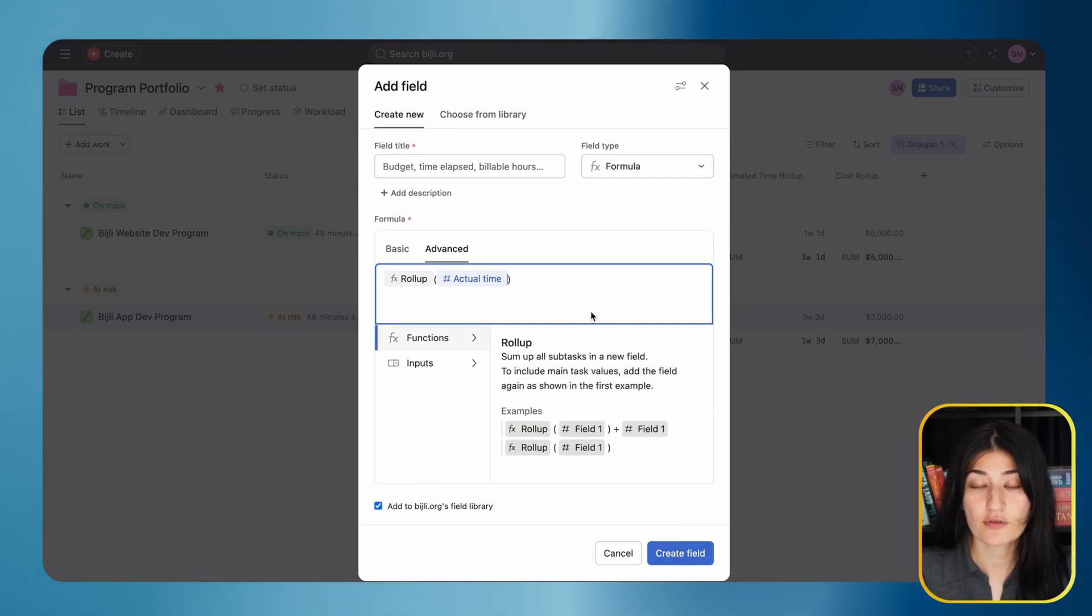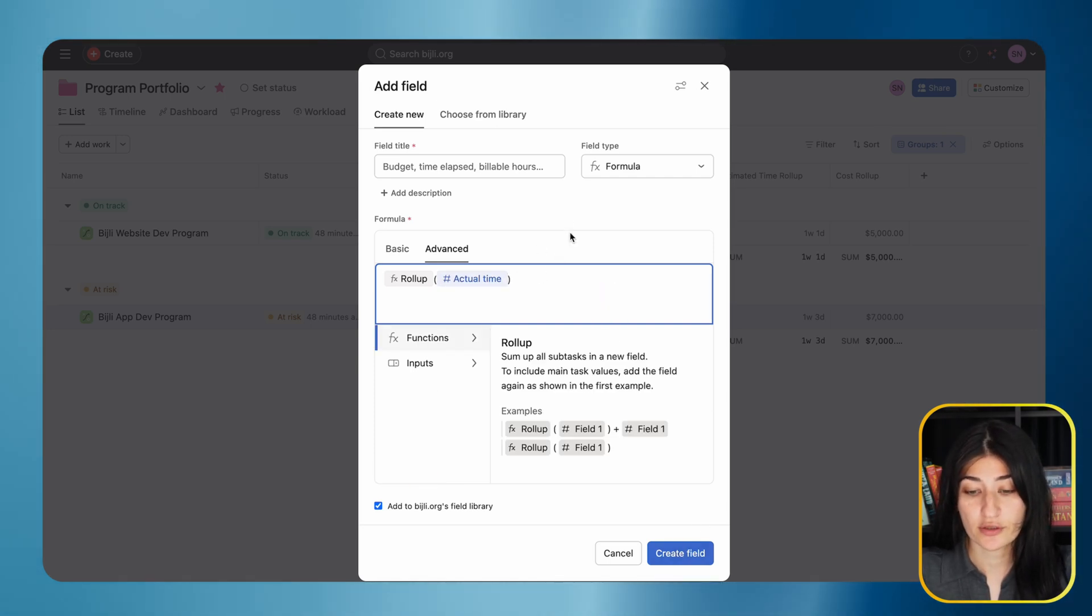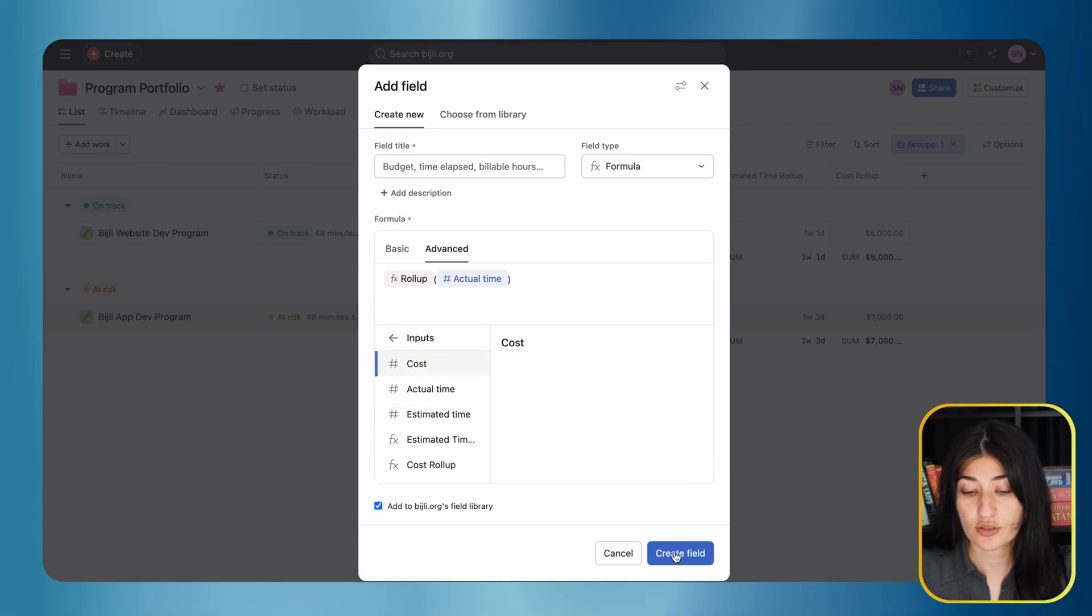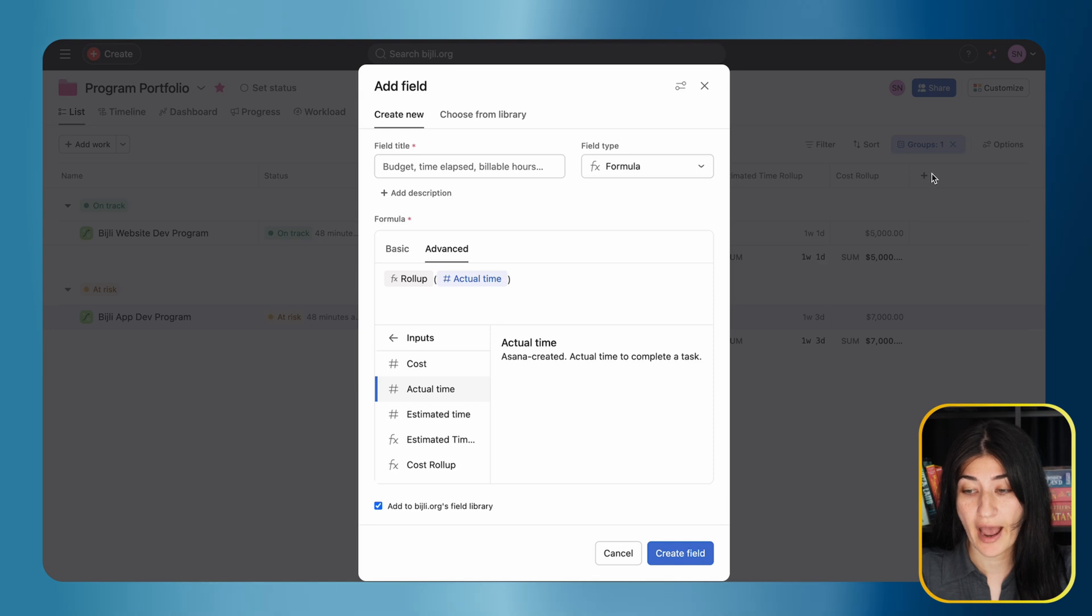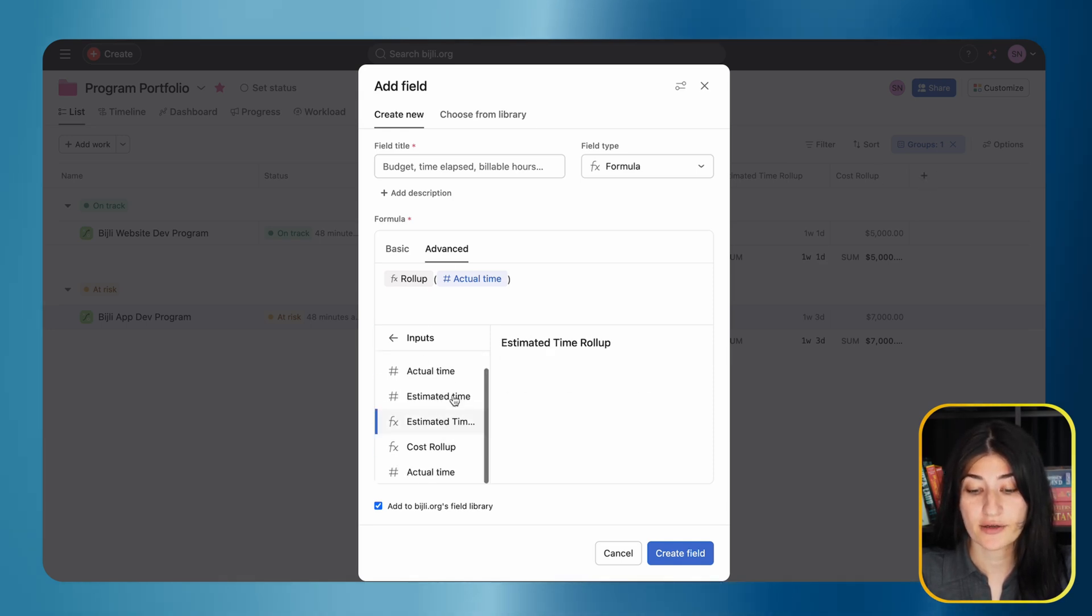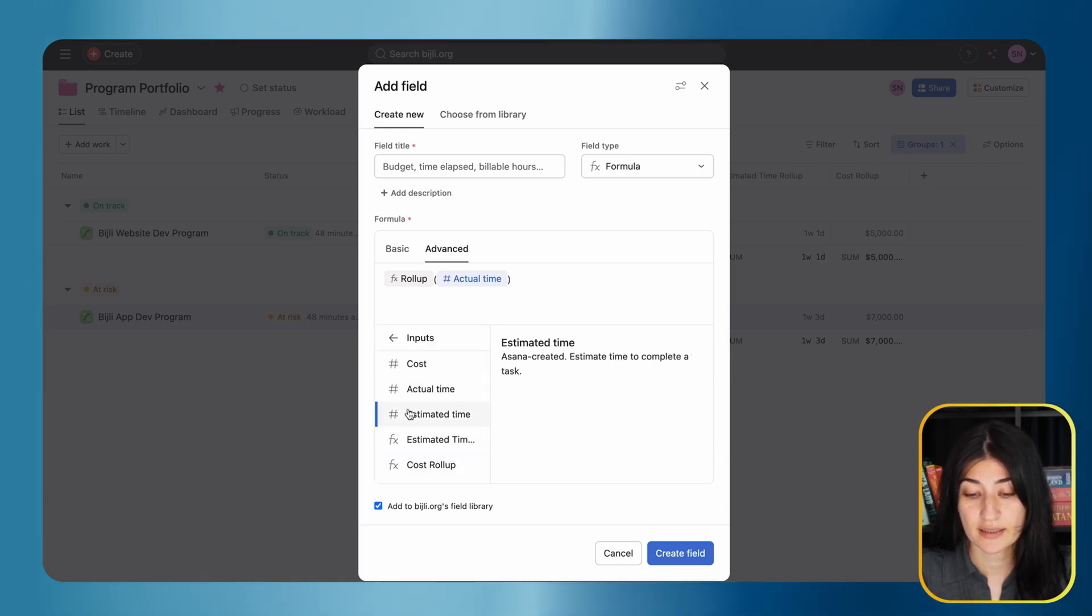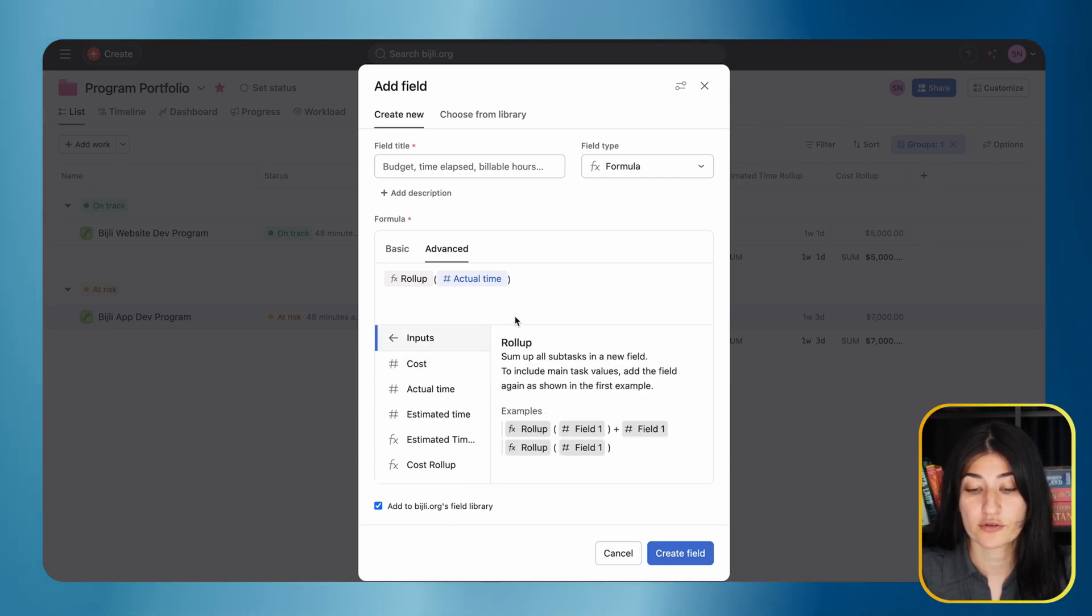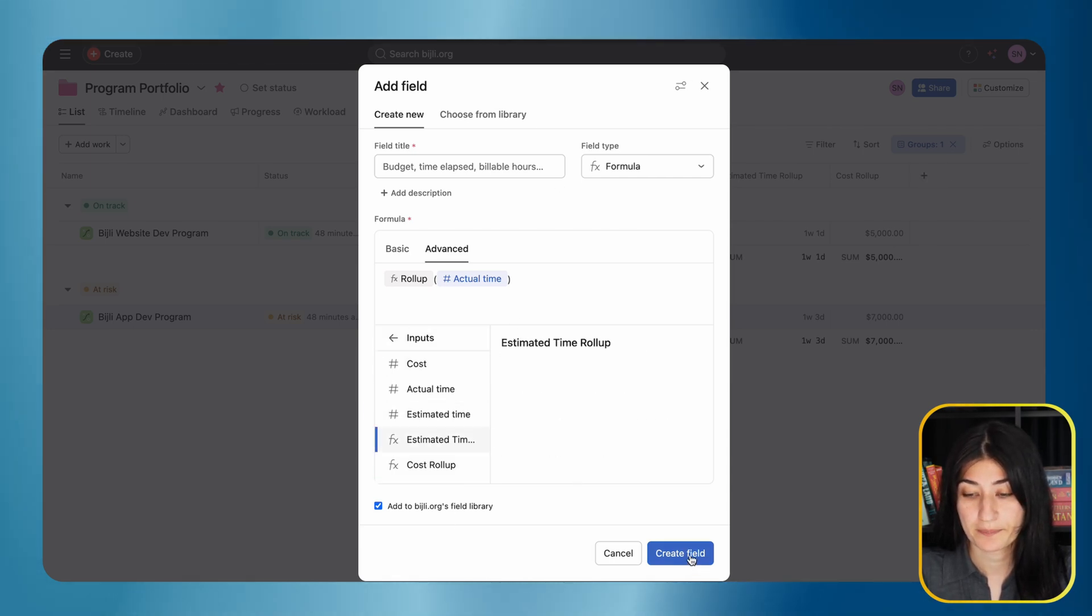If you're following along and trying to create these roll-up fields and don't see these inputs, you want to make sure these fields are added as fields within the program. That's how you're going to see them here. If you don't see them and you're struggling with that, make sure you add that field to the program before you do the roll-up.